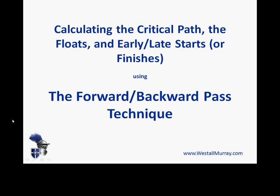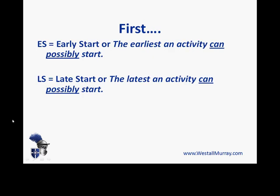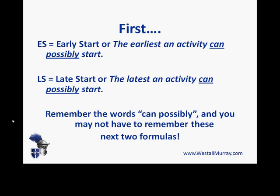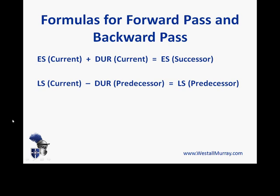This time we're going to use a more in-depth method for calculating the critical path and also float and slack of activities using the forward and backward pass technique. Early start is the earliest an activity can possibly start in the network, and late start is the latest that an activity can possibly start. Similar definitions apply for early finish and late finish. Remember the words 'can possibly' in both definitions. The formula for the forward pass: early start of the current activity plus the duration of the current activity gives us the early start of the next activity. On the backward pass: the late start of the current activity minus the duration of the predecessor gives us the late start of that predecessor.